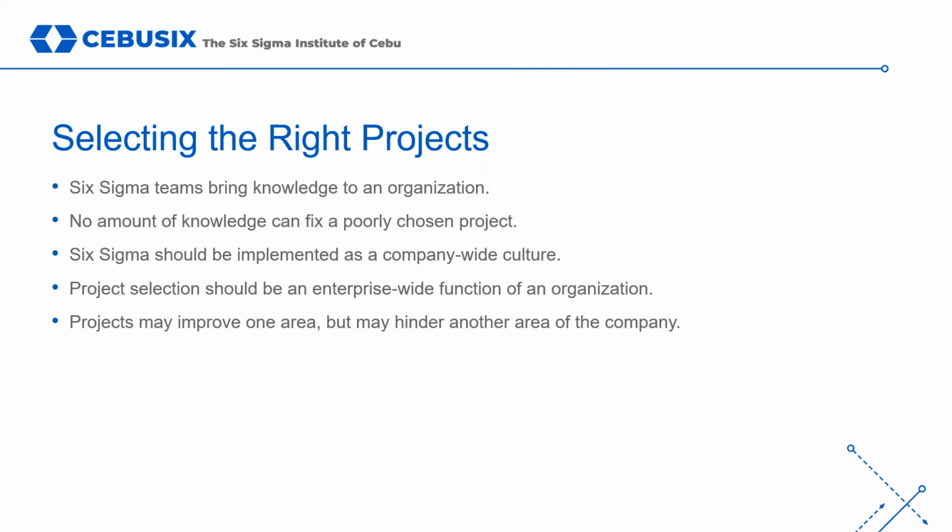Many organizations struggle with how to find high impact projects. Project ideas can come from any source, such as process assessments, customer and employee surveys and suggestions, benchmarking studies, extensions of existing projects, and so on. You should avoid or redefine projects that have fuzzy objectives, poor metrics, no tie to financials, too broad in scope, no connection to strategic or annual plans, solutions have already been identified, or where there are too many objectives.